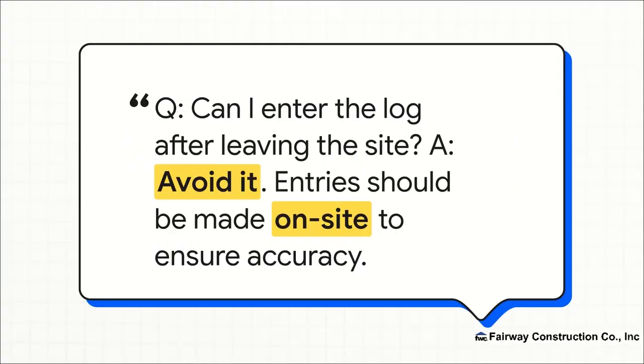And this really hammers home that last point. You might be thinking, can I just catch up on the daily log when I get home? The SOP is crystal clear here. Avoid it. The entire value of that daily log is wrapped up in its accuracy. And that accuracy can only be guaranteed when the entries are made on-site in the moment.